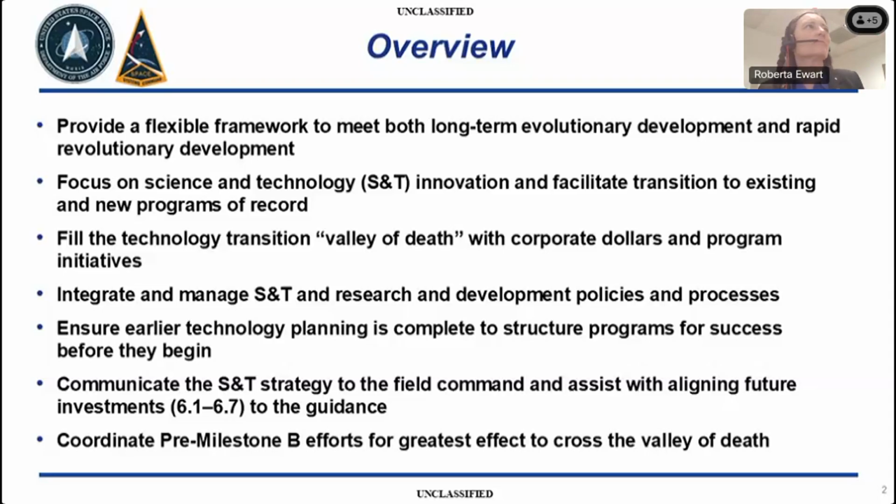Why is T&E important? Well, it's on a key stepping stone path that we call technology readiness levels. Many of my colleagues in the cyber community may not know technology readiness levels. It's basically a step-by-step understanding that things mature. The higher the technology readiness level, the lower the risk and the better opportunity we have to transition whatever that technology is into a future program and then into the field. Remember the stepping stones. Technologies need to go into some type of program or a system deliverable, and then they go to field. We have no technologies that directly provide capability to the field. Okay, let's move on to the next chart.